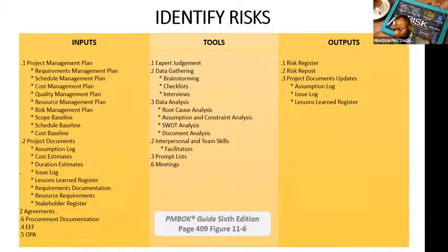It says a risk report is developed progressively throughout the project risk management process. The results of perform qualitative, quantitative, plan risk responses, implement risk responses, and monitor risks are also included in the risk report. So you could cut out of your risk register, whittle it down, and give it back to management. Management doesn't want to see the whole risk register. Just give it to them short and sweet.